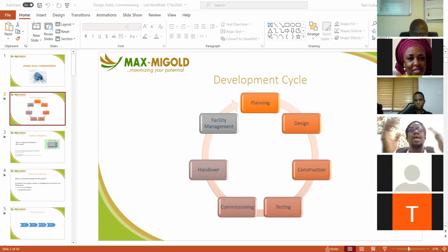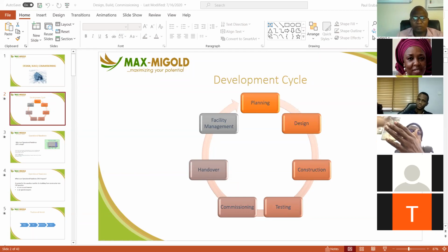For something as simple as a pillar they were casting, the formwork collapsed and the pillar expanded by a certain triangle in one shape. They cannot chip it off. You know what they do? They use rendering, plastering, to create a different size of pillar. So what you will see in the construction drawing and design drawing would be 450 by 450, but what we will see on the ground will be 500 or 550 by 750. So it is the as-built that you measure and draw.